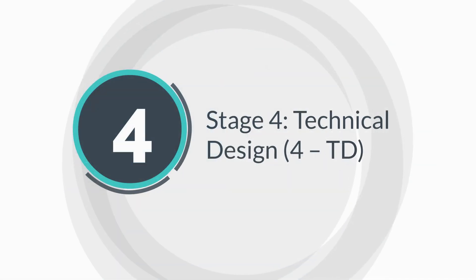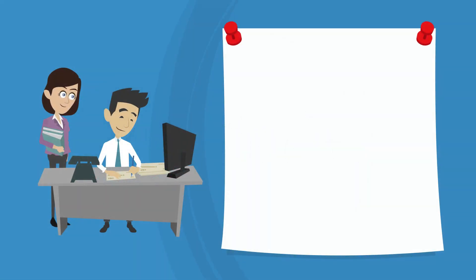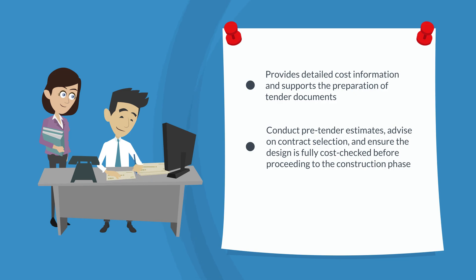Stage 4, Technical Design. During the Technical Design stage, the Quantity Surveyor provides detailed cost information and supports the preparation of tender documents. They conduct pre-tender estimates, advise on contract selection and ensure the design is fully cost checked before proceeding to the construction phase.